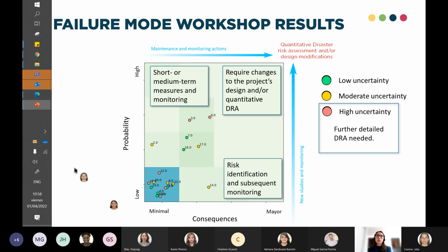It's more dynamic: if you get more information regarding one hazard or regarding exposure, or the design changes, the RMP can also change. So it's important for it to be updated, right? We don't want this to be one big document that no one reads and sits on the shelf. You want this to be more alive.